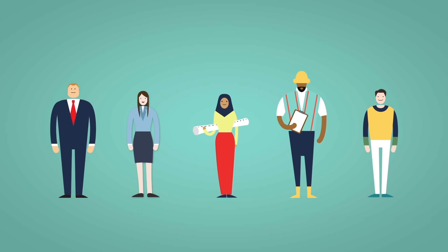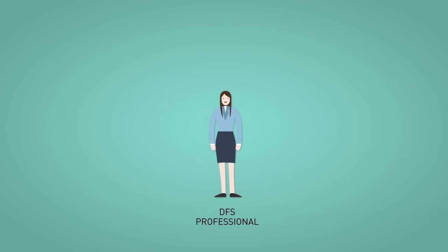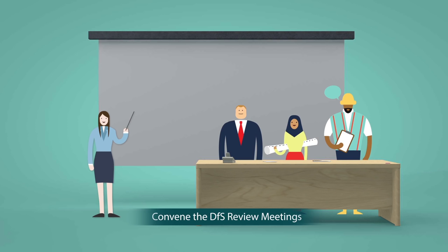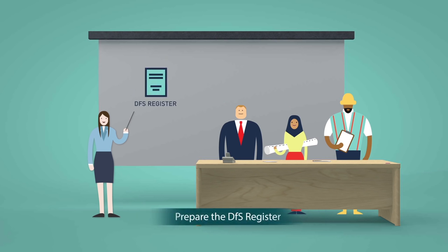The developer may engage a DFS professional to assist him with his duties to convene the DFS review meetings and prepare the DFS register. The DFS review meeting provides a communication platform for the developer, designer, and contractor to review the design risks. During the meeting, the designer and contractor will have to inform the developer of foreseeable design risks. All crucial information must be recorded in the DFS register.